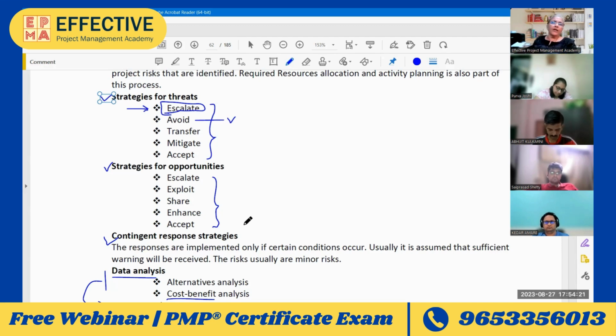In case of a project situation, let's say I'm working on a schedule constrained project. The customer has said that you have to finish the project by this date, otherwise there is a penalty for you. We have started with that contract, and halfway through I have realized that there is some chance that I may not be able to complete the project on time. What I do is I outsource some work to a vendor.